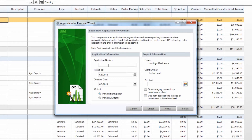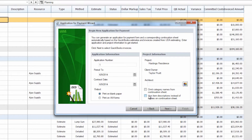We can continue and give the application a number, which will by default increment starting at 1 and going to 2, 3, 4 as you create new applications. You can choose a period-to date for the invoices you want to include, the contract date. The project and client have already been populated for us, and then you can choose an architect. You can also choose a few other options for how the information will display on the continuation sheet, whether you would like to omit the category names or to use item descriptions instead of names, and once you've selected your preferences you can continue.